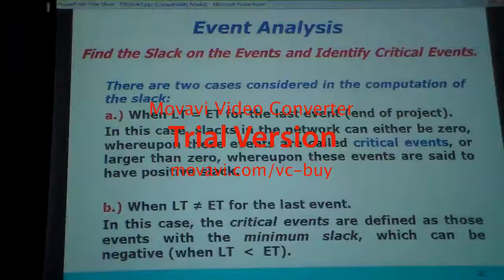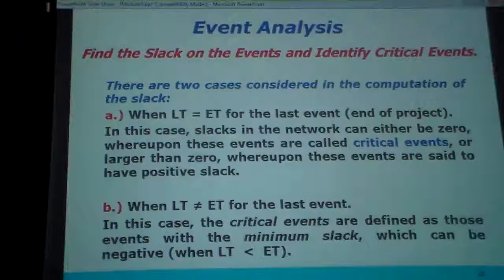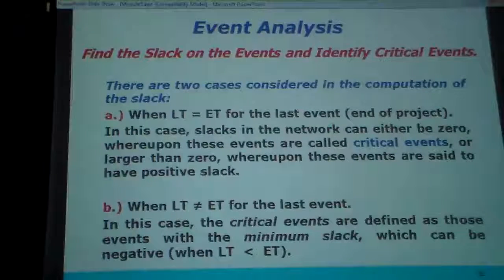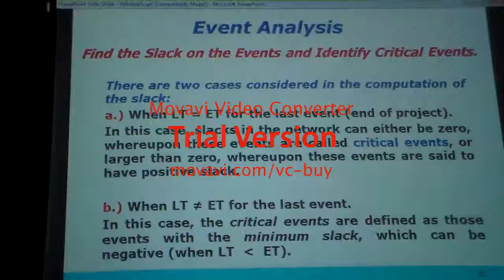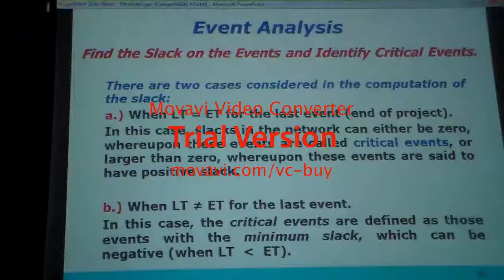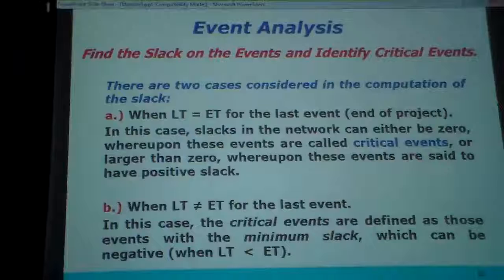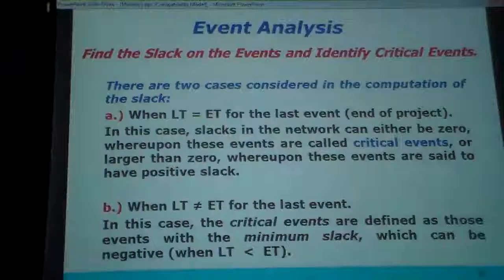If we are in a critical event, if we have any delay in that critical event — any week or any point of time — it will change the total time of the project. Slack equals late time minus early time. There are two cases considered in the computation of the slack. When late time equals early time for the last event, sometimes in a critical event we have to put two squares. But when we go to the end — the critical path — this one should be equal to this one. There is no difference. In the previous slide, always this is late time and this is early time. But in the critical path, they are equal — slack is zero.